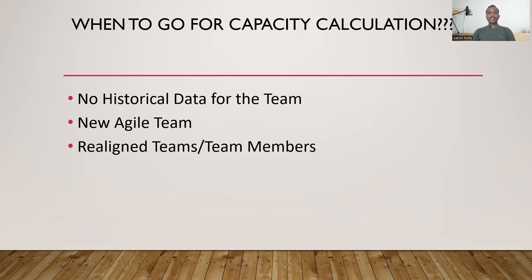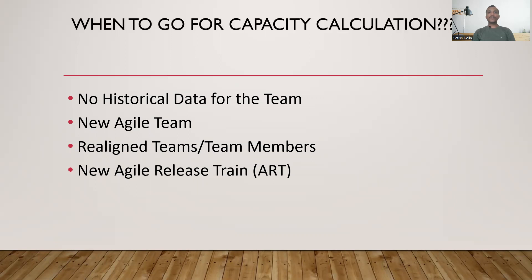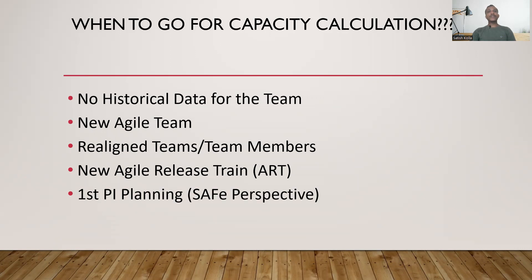And even if it is an existing team or a well-matured team, if in case the team is realigned or repurposed — either the whole team or the team members — that's when we will also be considering the capacity calculation. From the SAFe implementation perspective, if it is a brand new Agile Release Train, or if it is a first PI planning, we will be considering the capacity calculation.